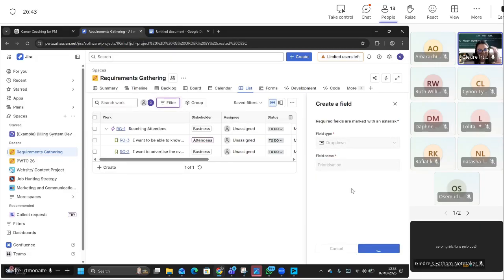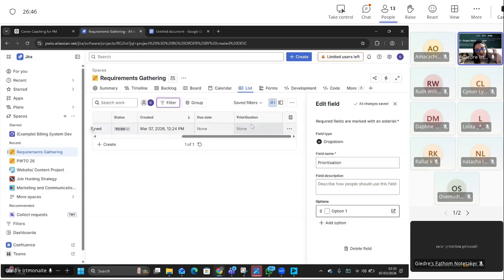So from prioritization, remember we're going to use the MoSCoW technique. If you're not sure, if you reread through the requirements document that I shared, you'll be able to understand everything it means. But with MoSCoW prioritization, essentially, it's must have, should have, could have, won't have. So anything that your stakeholder says is a must have, you're going to have to do it, no choice. Anything that's a could have, it should be nice to do. Usually in real life, it becomes must have versus nice to have. And the teams, especially finance, will be like, but is that a must have or is it nice to have? Anything nice to have, you can basically forget getting funding for.